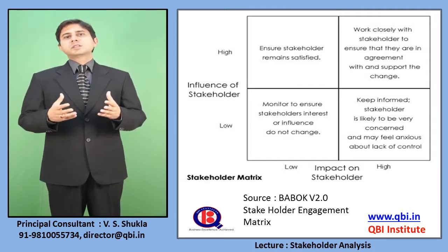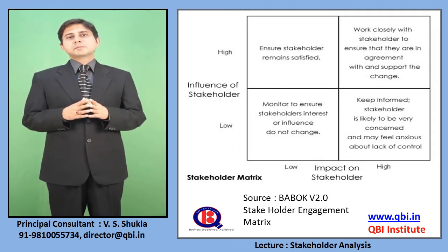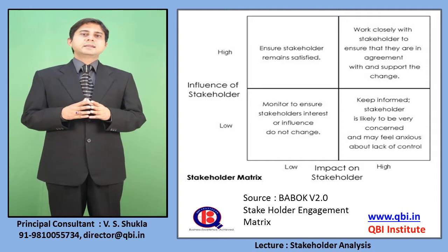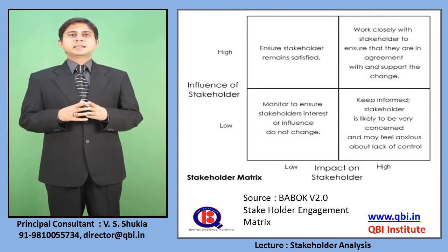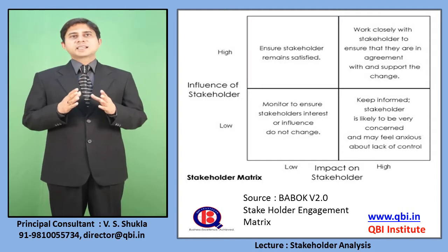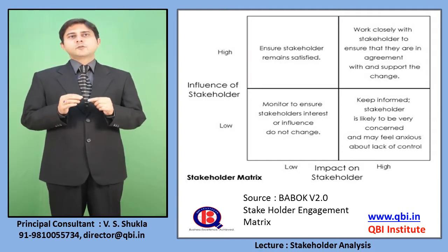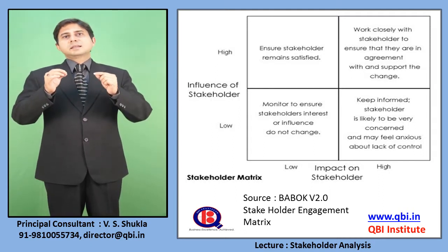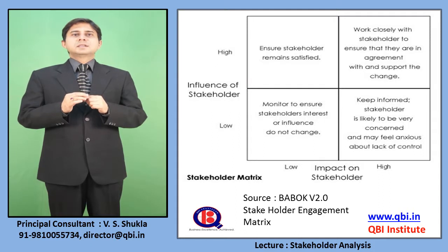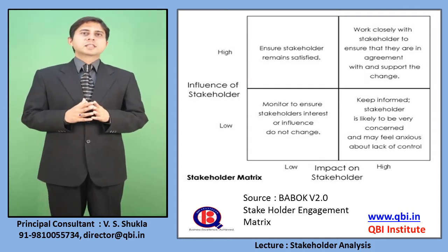Coming back to our original example where we are implementing a CRM system in a company, and this CRM system is to be utilized by the marketing department, the head of the HR is one stakeholder whose influence is high, but the impact on him by the implementation of this solution is low.